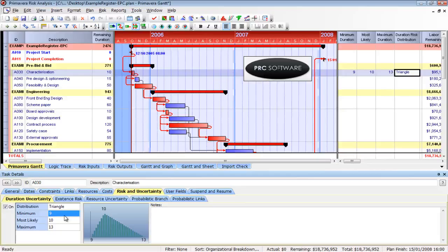So it's very important, if you're going to use other distribution types or you're going to deviate from the norm, be transparent with it. Tell people that you've done it. So you're not hiding what's going into the system. There's a lot of bad press on Monte Carlo analysis because you can make the answer say whatever you want, and if you're hiding the inputs and you're building things in like correlations, distribution types, things that are hidden to rig the answer, people know the answer isn't correct, but they don't know why. So you lose credibility, the analysis goes down the tube, and you see it all too often, and it's a shame.